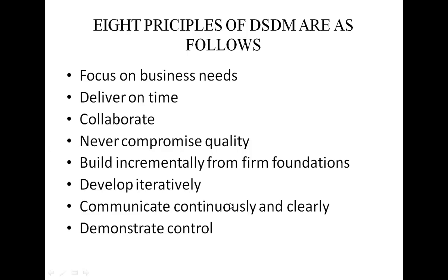Measure your progress on the products delivered rather than the tasks completed. You have to mainly concentrate on products delivered.